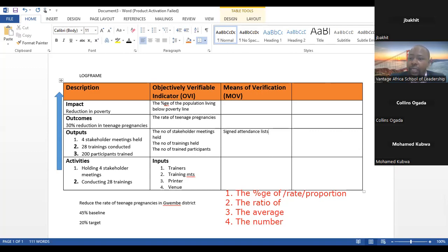Now, you see, this is an original primary document, and therefore it is more believable. A report, someone can sit under a tree somewhere and come up with a report. They can get into a coffee shop. But signatures, it's a little bit hard to get those signatures. But then on top of that, if you went to a hotel, there's the invoice, there's the payment receipt. All those original primary documents, not the secondary documents like a report.